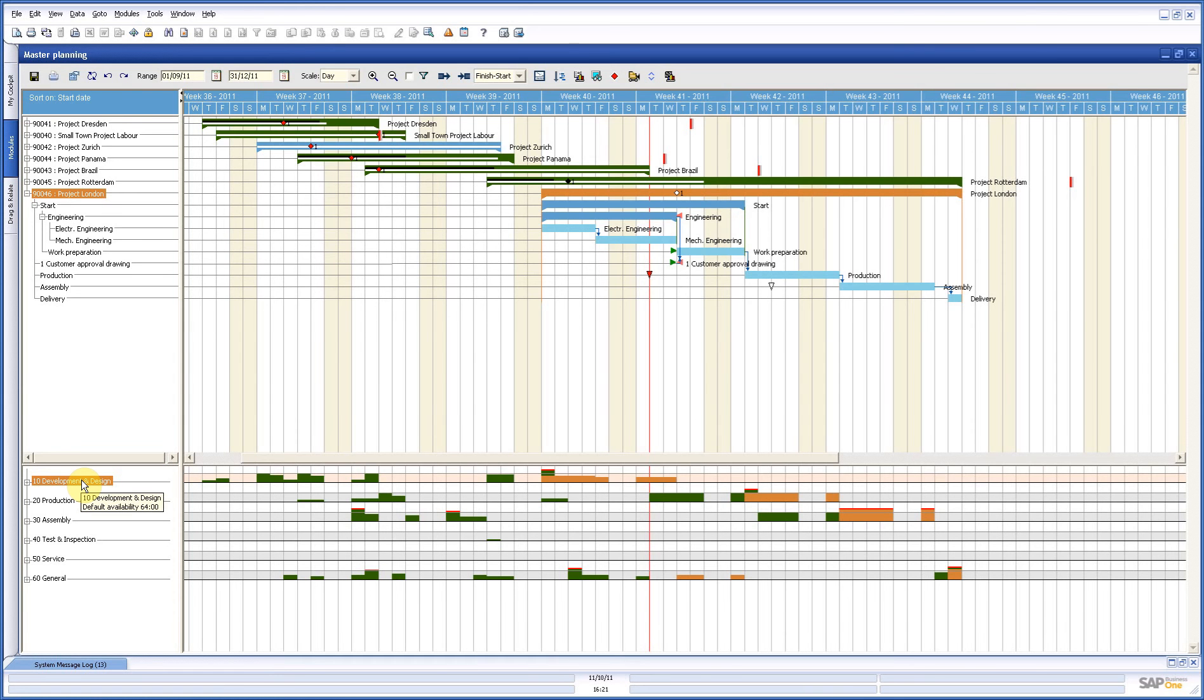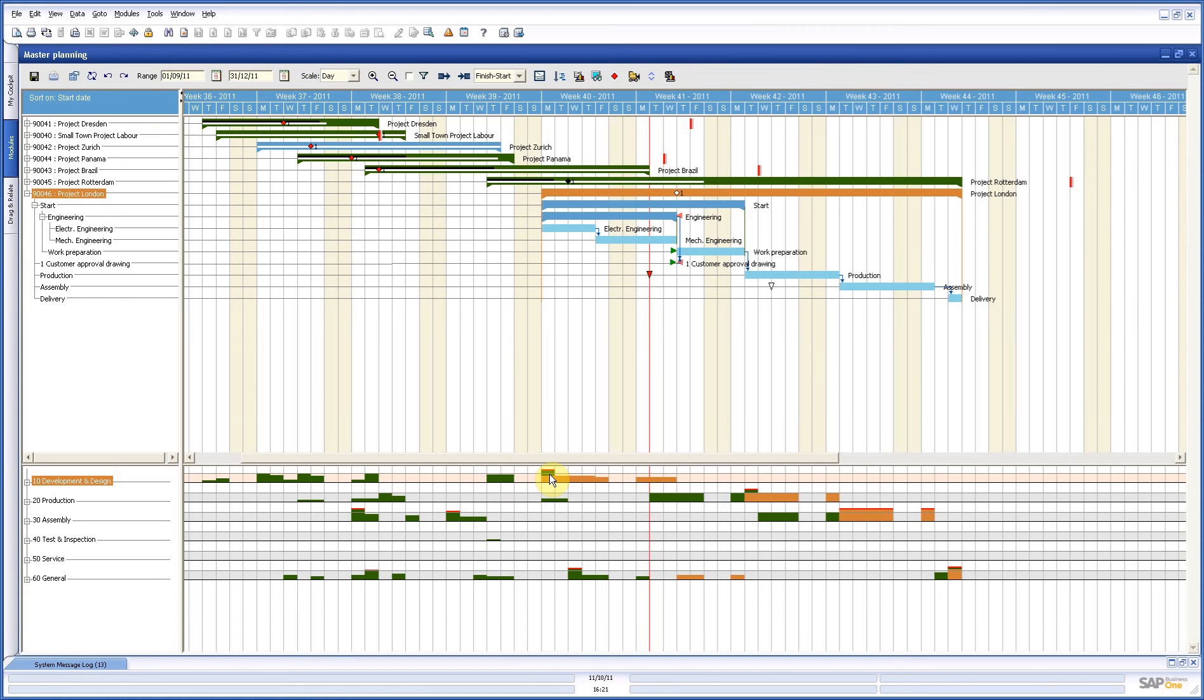Or, and that is what is needed in this case, you have to move around. Now, what do we see here? We see that you need capacity from this greenish project and from the brown one. So, if we pick up the brown one here and we move that to the right, then we see it is working.